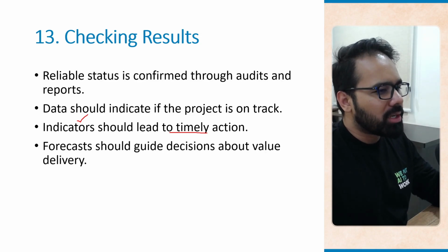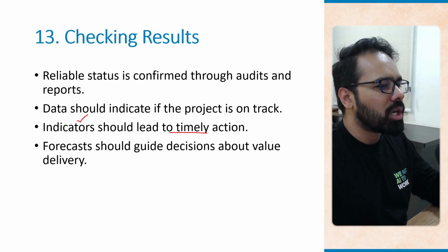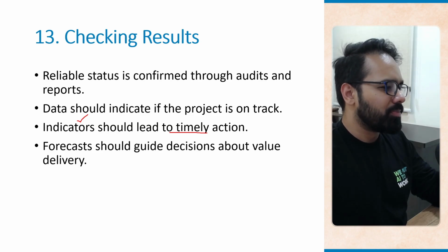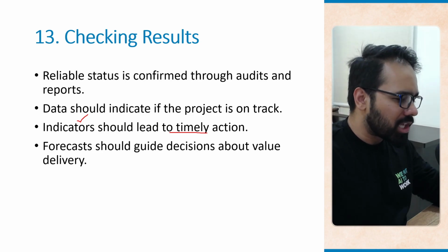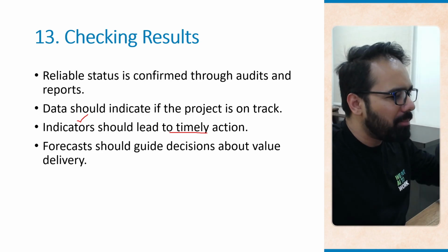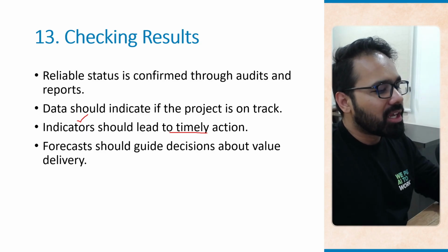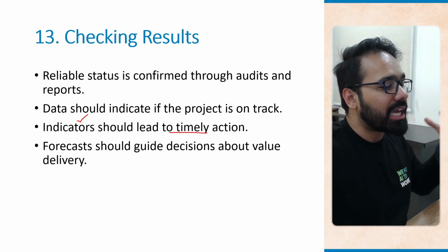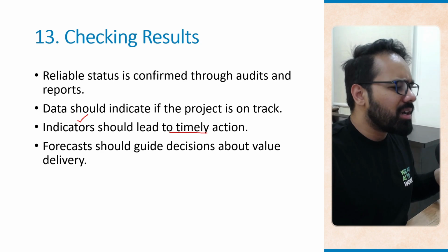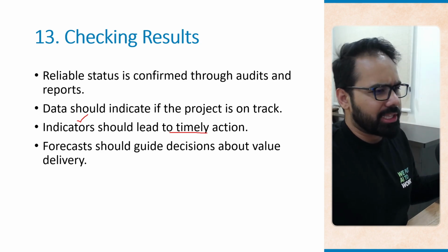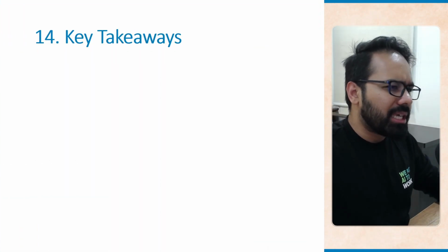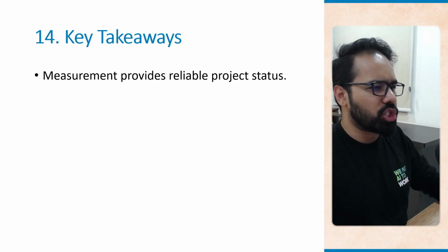Forecasts should guide decisions about value delivery. Now, here's the thing. A forecast showing delayed payment integration may trigger the decision to reprioritize features for an earlier launch altogether.